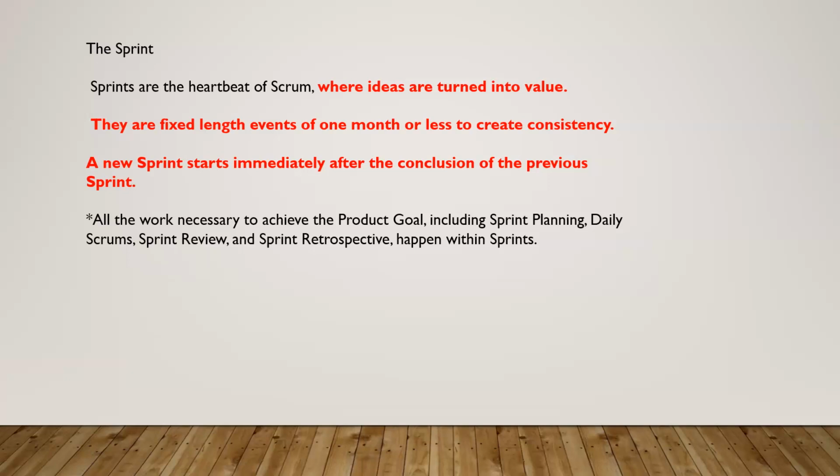How does the team decide if it should be 2 weeks, 3 weeks, or 1 month? Yes, the team has to decide depending upon the complexity of the product or the complexity of the sprint goal. Mostly on the sprint goal, because the particular tasks they are taking are called user stories. Depending upon their complexity, if they feel they can't do it within 2 weeks, or within 1 week, then they are the ones who are going to decide on that.